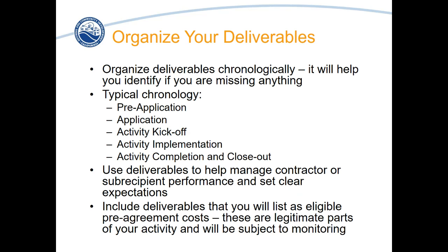Use your deliverables to help manage your contractor, subrecipient, and consultant performance and to help set clear expectations. When you use deliverables in your RFPs and RFQs to really direct the scope of work, it makes it much easier to actively manage what's happening with your contractor, so that they know that at 50% of budget expenditure, you should have XYZ products in hand. You're not sitting there with 90% of your budget expended waiting for your first deliverable, because that can often be a really uncomfortable position to be in.